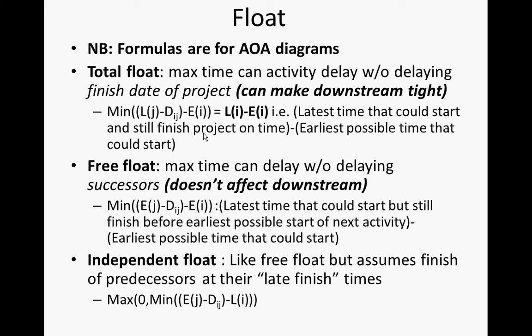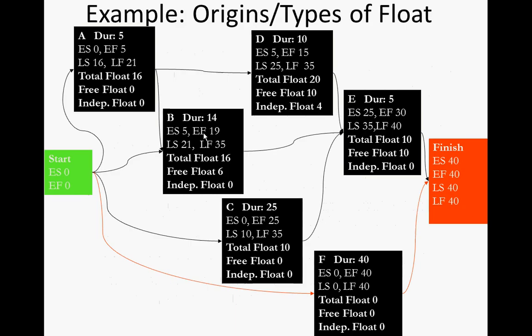But if I can show that my delay or my inability to absorb that delay without cost was due to somebody else, to another contractor, then it may be that they're the one ultimately liable. So these issues of float come into play in that context.